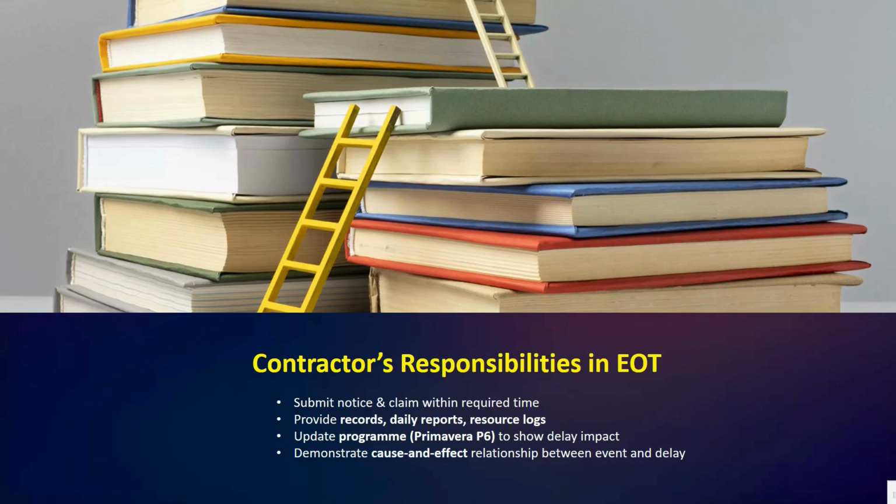Then last, we have show a clear cause and effect relationship. Here you can see, demonstrate the cause and effect relationship between the event and delays. It is very important to show a clear cause and effect relationship between the delay event and project completion. So in short, evidence, records, and schedule updates are the backbone of every EOT claim.